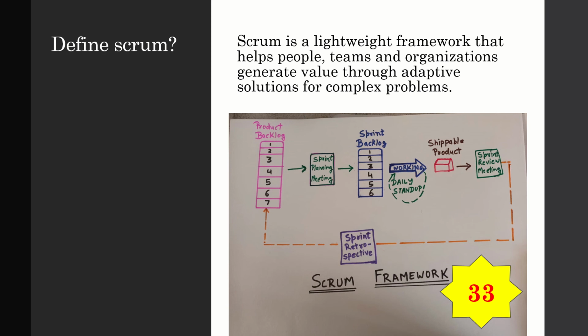workflow. So first, a product owner creates the product backlog. The product backlog will have separate items like epics or features. So I can see that there are 7 features in this product backlog. Then the team would start taking one feature, and in the sprint planning it would get discussed, and the sprint backlog would come up, and then the sprint would start.